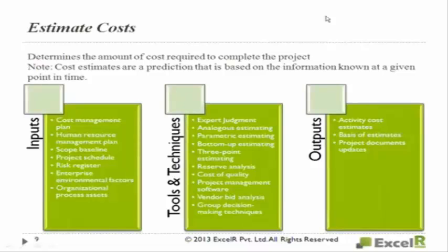So you have to know these terminologies, direct costs, indirect costs. It may feature in the examination or not, but in your day-to-day work, the terminologies and the nomenclature are very important when you are communicating with your stakeholders, your customers. So for the activity cost estimate, for each activity, how much it costs, you will do an estimation, and you do a basis of estimation. Basically, on what basis did you estimate? What is the confidence level of your estimation?